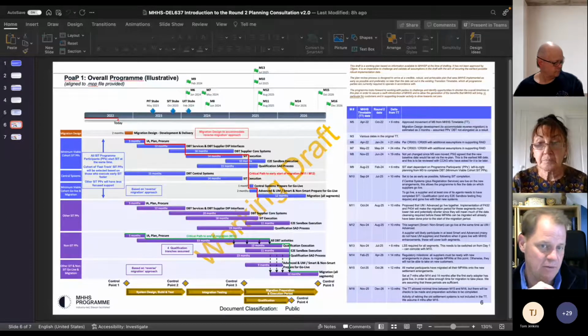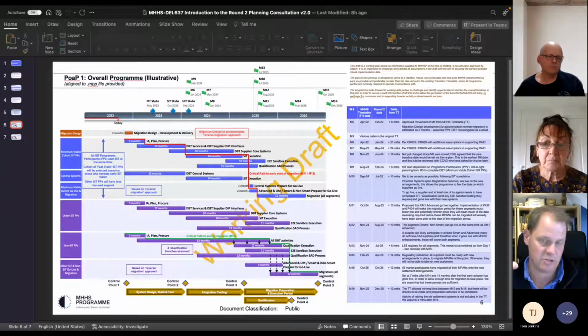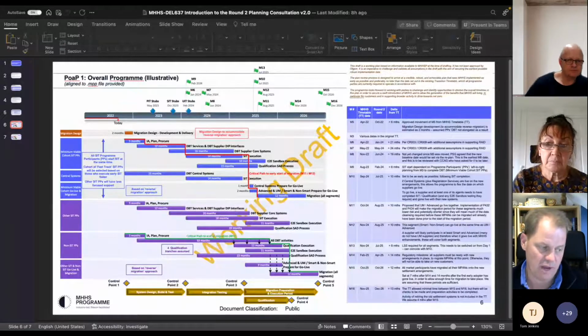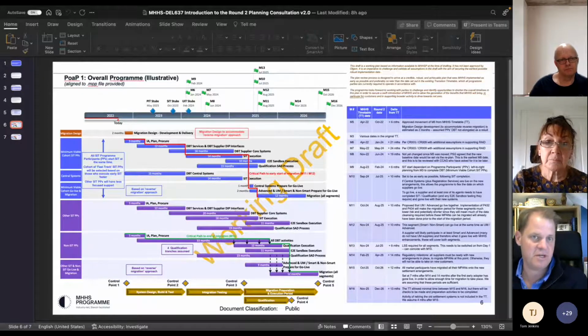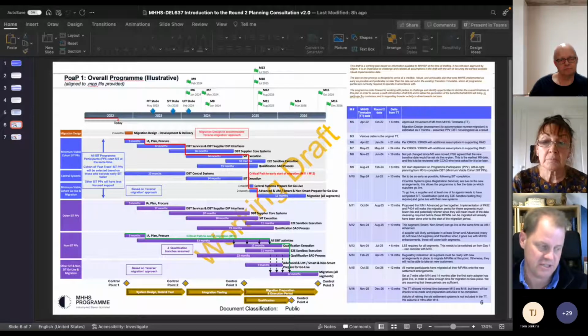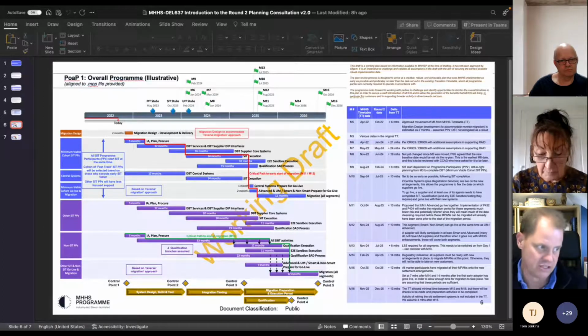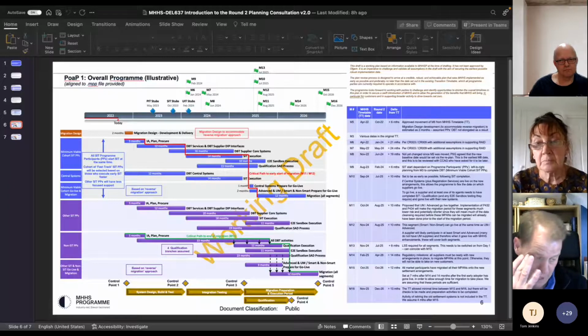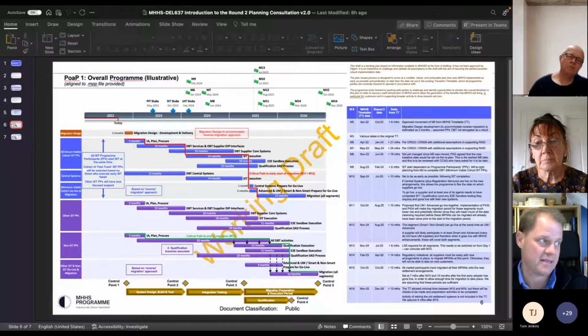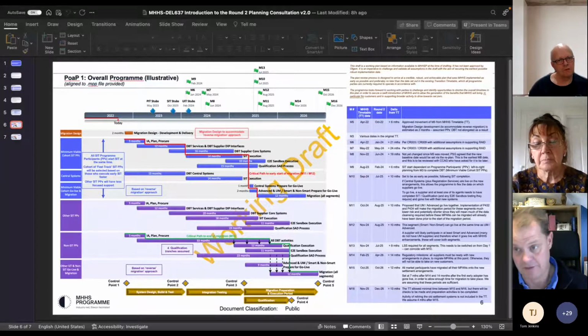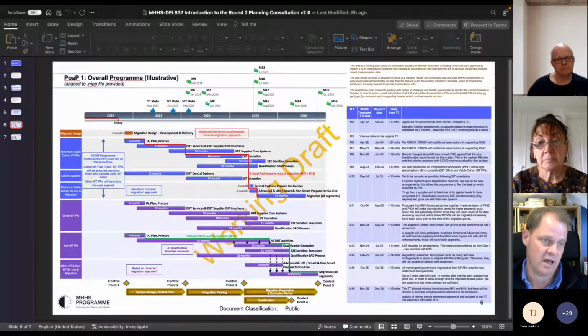I think it would help if we were clearer, and it might not be in this diagram because we're trying to take a helicopter view in this diagram, but it might help if we were clearer where the entry point into SIT is, and particularly the component integration testing is for each of the parties who are going to participate in SIT, because we have got an incremental build-up of parties through component integration testing, and there is a principle of when the central parties join, and then when registration joins, and suppliers and supplier agents, and I think that, Jenny, might help clarify exactly when we expect registration systems and UMSO for that matter, Alex, to be ready for component integration testing, and then as a consequence executing through SIT.